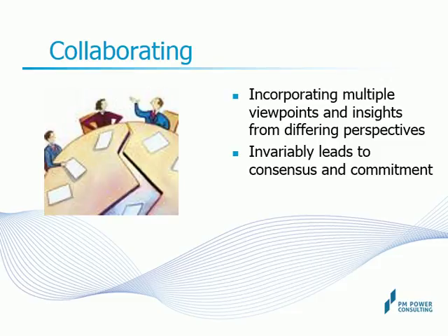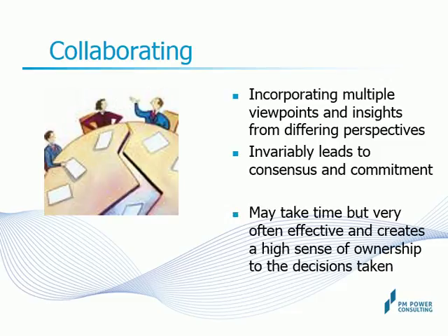You and the customer get together and come up with an approach to address both interests. The customer would give a conditional sign-off of the documentation as is. The team would return back to base, add more detail to the document, and resubmit. The team would also hold 4 webinars meant specifically for end users who have queries and clarifications. The customer would then provide the final sign-off. Isn't that resolution fair to both parties? Collaborating as an approach does tend to take time but drives ownership of decisions.